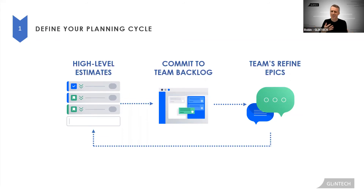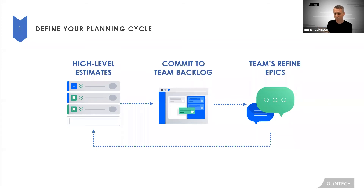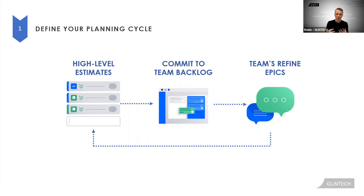Anyway, when the team gets that epic, they can then start to flesh it out. They'll then put stories and the tasks that are required to deliver it. They'll estimate them as well. And these more accurate estimates will flow back up. It's that dotted line back that's often missing, and replace that initial high level estimate of 200 points with the more accurate estimate of maybe 250 points. And now — and this is the magic bit — we can re-plan based on that more accurate information.